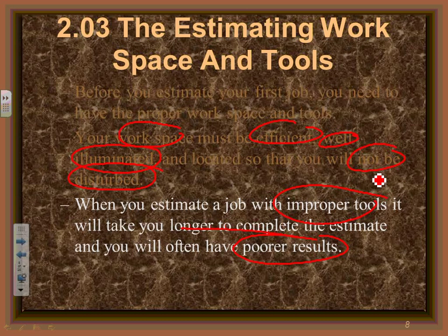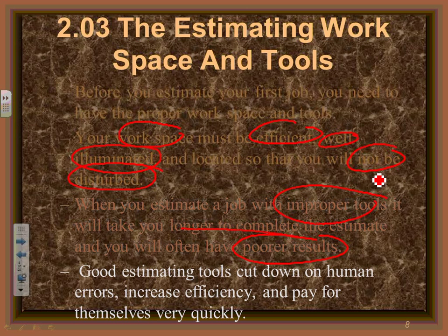The top-notch estimating, guys, right now is on-screen estimating takeoff. They do the takeoff directly from the blueprints through the computer. You interface the CAD or Revit tool. You can take them to another software. They pull all this information directly from them and you verify it. You don't go highlighting and what not. Though still, a lot of people are still doing it by hand. So be aware of that too.